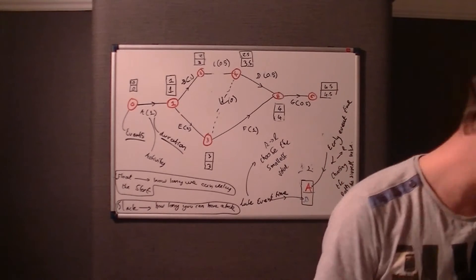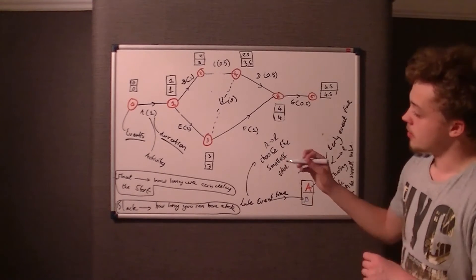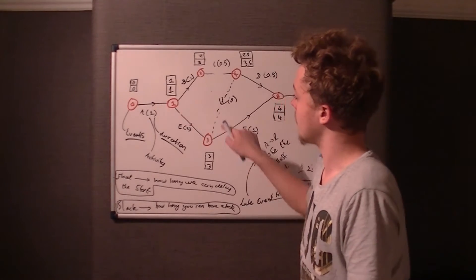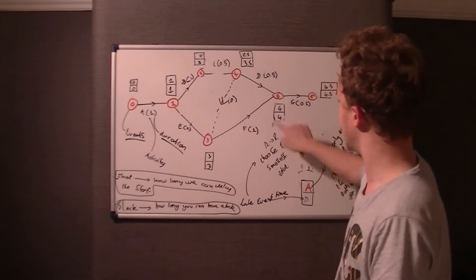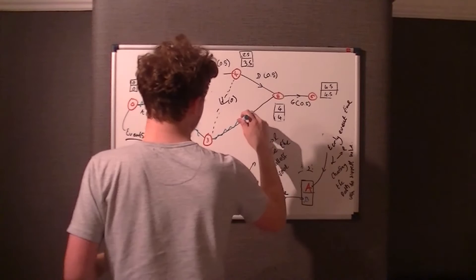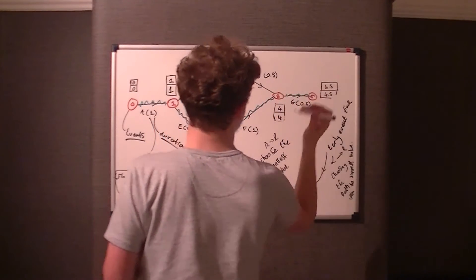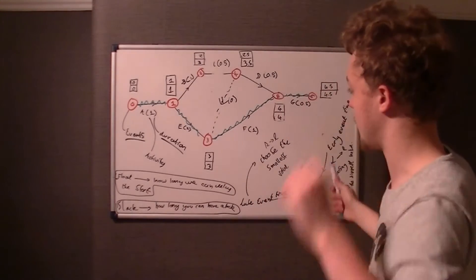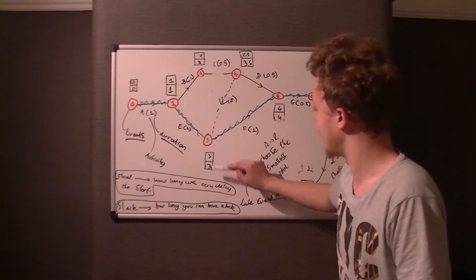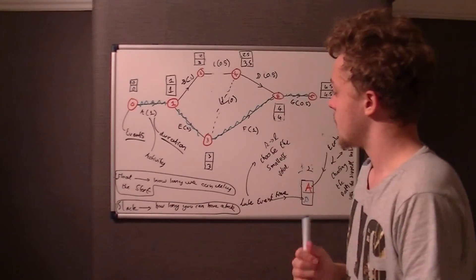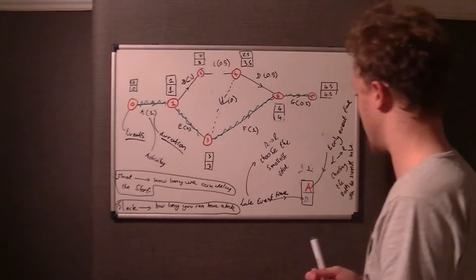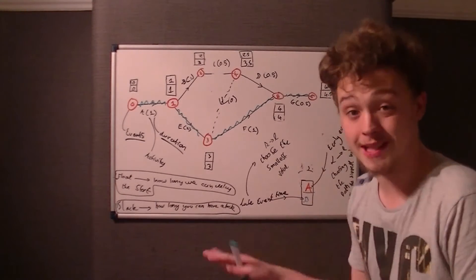From this we can identify the critical events and critical activities. The critical activities are those where the numbers are the same: 1|1, 0|0, 3|3, 4|4, and 4.5|4.5. I'll colour the route in green — that's the critical path, joining up all activities where the start and end node have matching Early and Late Event Times.